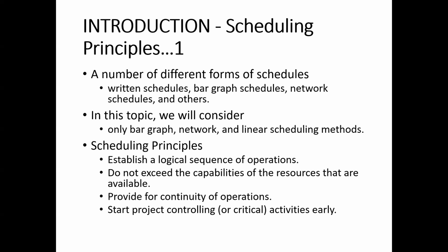So more focus should be placed on the critical activities, because if these activities are delayed, the project will be delayed. The other activities are called non-critical activities. Those non-critical activities are also important, particularly if there are some resource constraints.